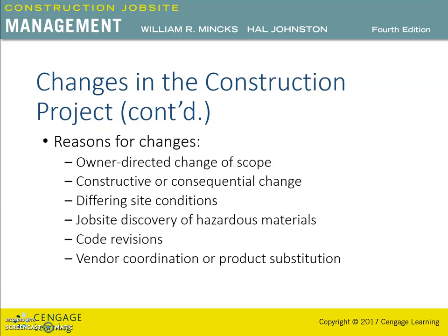Sometimes the new product completely fills the requirements specified by the original item, but often it will take longer to obtain, cost more, and require a longer installation time, which can require changes in time and/or money, as they can be a possible change of scope. So these were a few reasons for changes in the construction project.